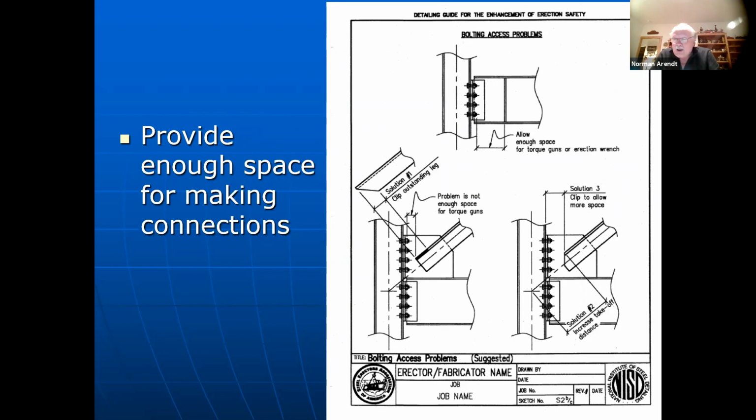We constructed out of cardboard, full scale, those connections to prove to them that it was not possible to make the connections as designed. And that was really eye-opening for them, and that actually led for us having the capability to put our signatures on all of the three major tied arches in the state of Wisconsin.